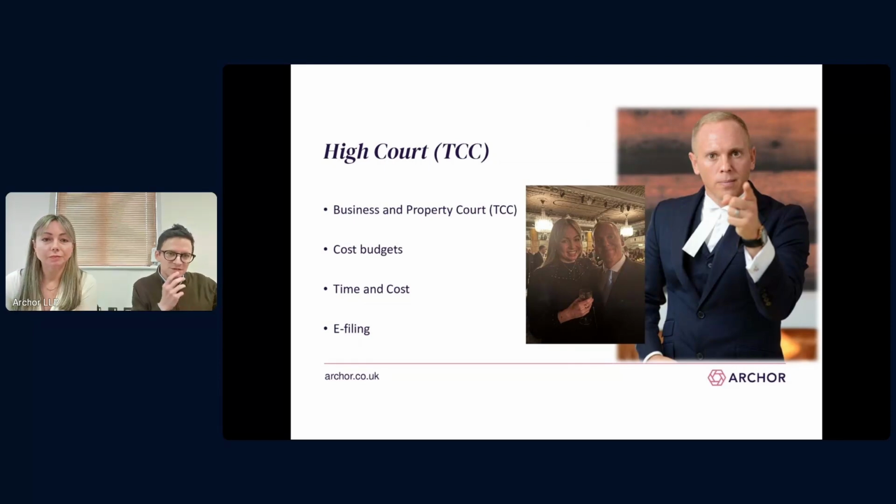Usually it takes sort of 2 to 3 years to get to trial in a TCC claim, although I think I read some stats a year or two ago to say that only 80% of cases don't get to trial. They end up settling before, so it's quite rare to get there. In court proceedings, the costs, i.e. the costs of us, for example, experts, court fees, are generally recoverable, and the overriding principle is that costs follow the event. So effectively the loser is ordered to pay the winning party's costs.